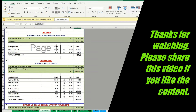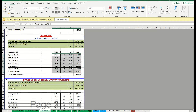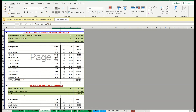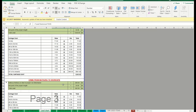For coarse sand the lead distance is around 189 kilometers — same calculation process. For bitumen, it is normally obtained from IOCL refineries in Mathura or a few other locations, so that will be a huge lead distance. Like this, once you have calculated the lead cost — the cartage cost — for all materials, we then calculate the material cost.